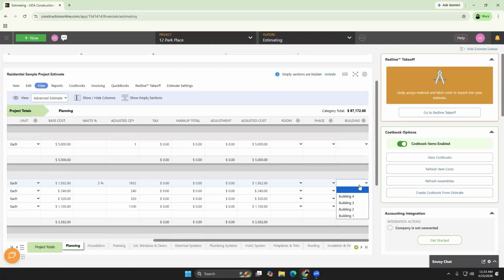There's other customizable categorizations you can add to line items as well, such as stage, trade, type, group, floor, giving you several options for ensuring you know what is happening where. And building off that same principle, descriptions, specifications, and notes follow the same logic. The estimate captures information that your team, subs, and potentially your client will need later. The more complete that record is when you build it, the less anyone has to reconstruct it mid-project.